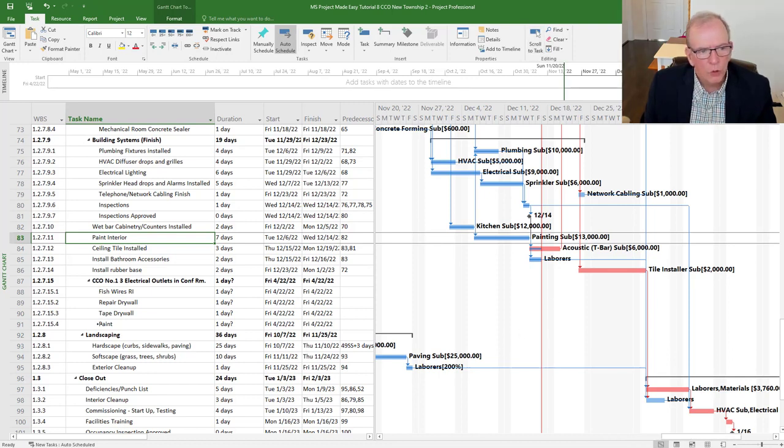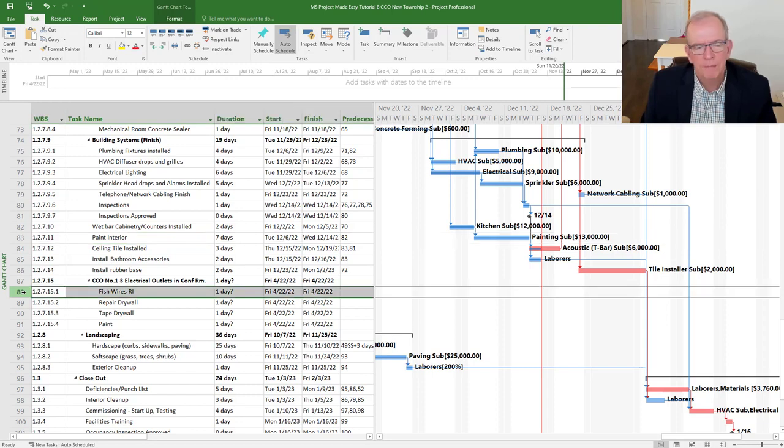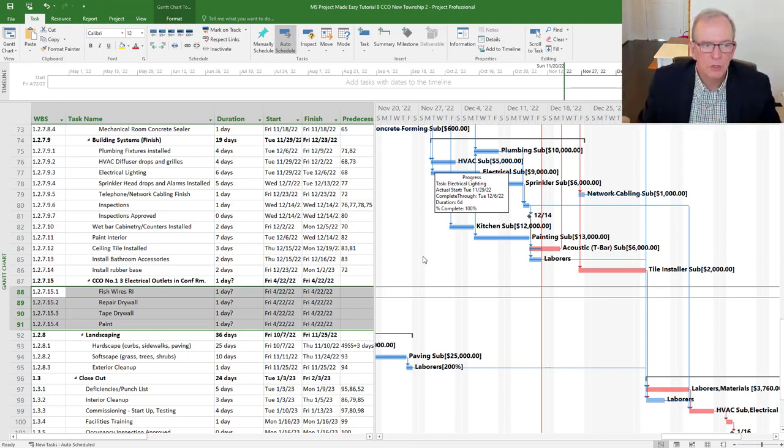So these 4 activities, you know what? They happen to be sequential. I'm trying to keep it simple for this example, but as I said, you could have multiple things going at once. You would just put them in the way you want to run them. If you want them concurrently, you'd have several activities starting at the same time. If you want to have negative lags or lead times, you can do all of those things. So I'm just going to put that I want them linked, and I'm just going to go up to this link shortcut here because I've got them all highlighted, or I could have typed in the numbers over here for the predecessors under the predecessor columns. You'll see that this will change now once I click link, and there they are. All right, so now they're one after the other.